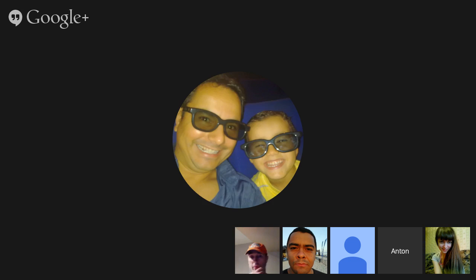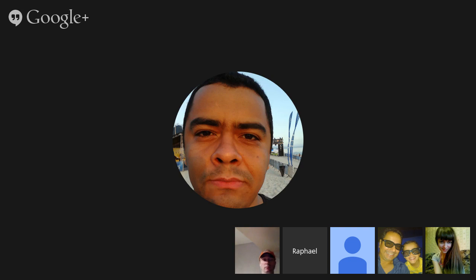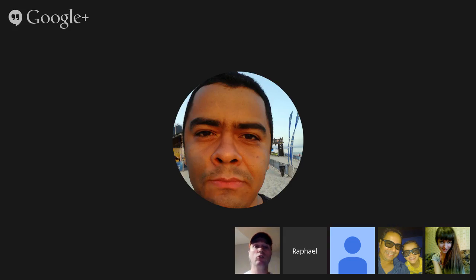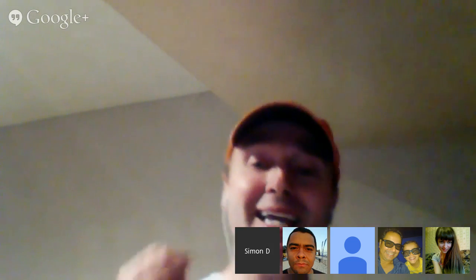Does this look pretty good, guys? I don't think so. Why not? Because the results are varying. I think perhaps in medium or long term, these results can be out of the average. I think out of the limits. Okay. Look what quality control, monitoring and recording the results. It has passed. But Raphael's right. There's a trend here, and the trend is upwards. Is there a problem? No. No, there isn't.